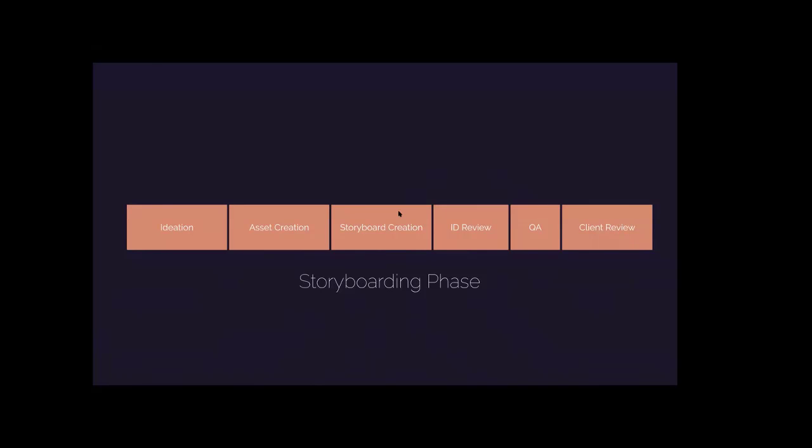Yes. So one of the things in this arena is where look and feel was being done, the storyboarding is also being done as well. And so those last three phases are pretty much staggered on top of each other. So you can kind of think that our phases are not really all that linear in this part of the process, but they are kind of layered on top of each other in a staggering kind of situation.